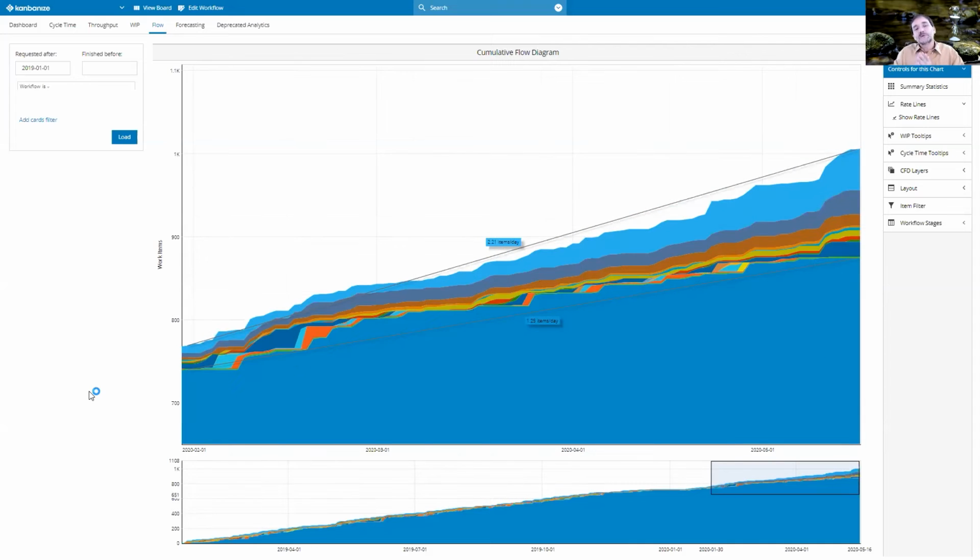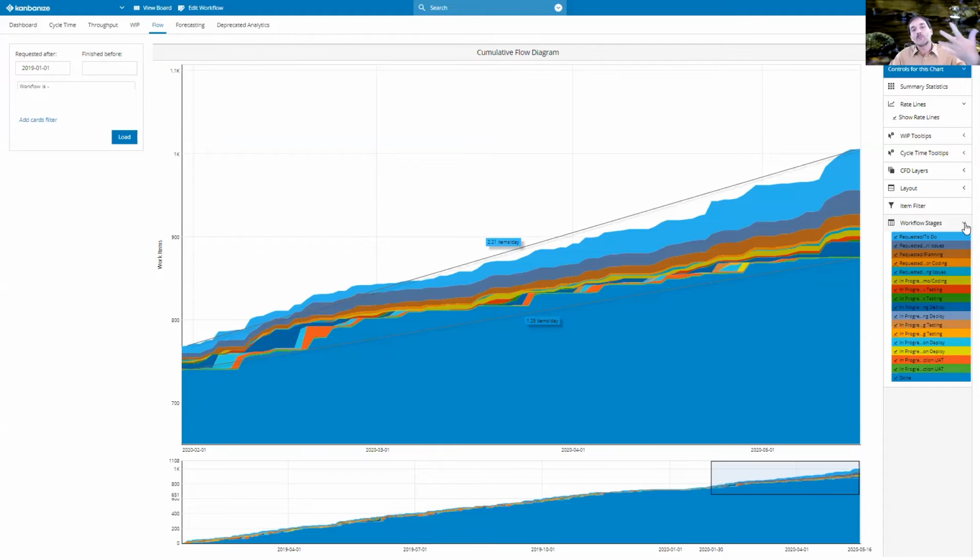One thing that we often see is diverging arrival and departure rates. But what does that mean? That means, for example, at the beginning, we had a WIP of around 50 items and an average cycle time of around 17 days. And because of Little's law, if we go on and we have at the end about 120 items, our cycle time at the same time increases as well. I must say that I cheated a bit. This process is not as bad. I brought in requested stages to make it a bit more pronounced.